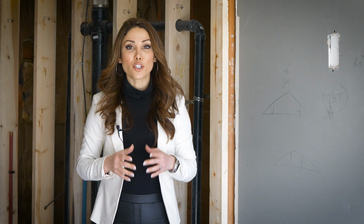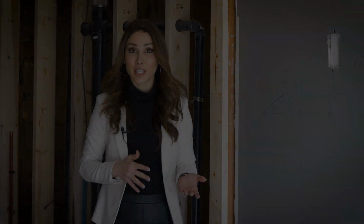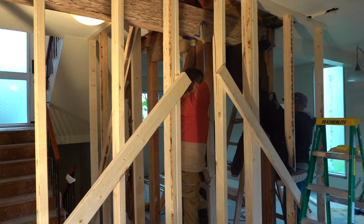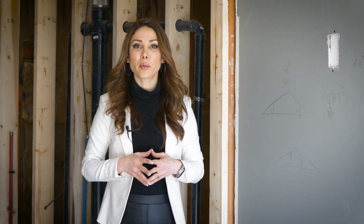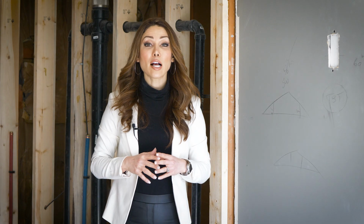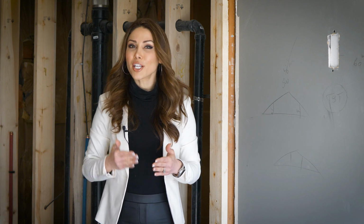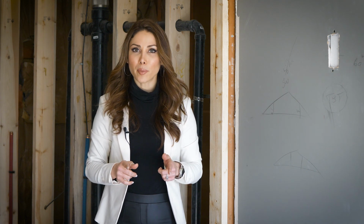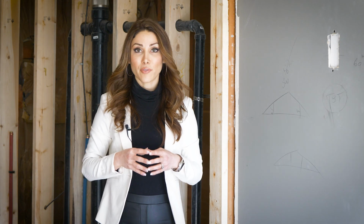Based on the type of renovation, you might need a permit from the authority, and this requirement slightly varies based on where you live. In general, here in Vancouver, anytime you need to remove a structural element such as walls and change the layouts, you definitely need a permit. You also need additional permits such as electrical and plumbing permits based on the type of renovation. For example, if you're planning a kitchen renovation without demolishing any walls and you're only changing the cabinets, floors and finishes, then you only need electrical and plumbing permits, and those get submitted through your professional contractors. This process typically is very quick.